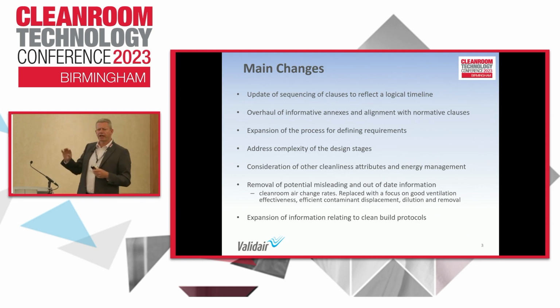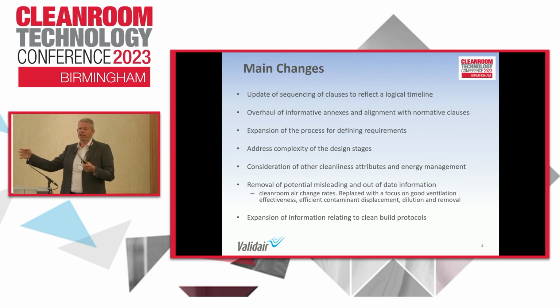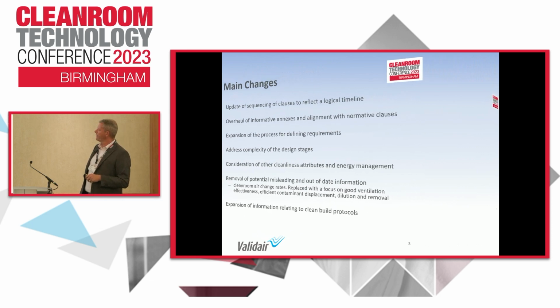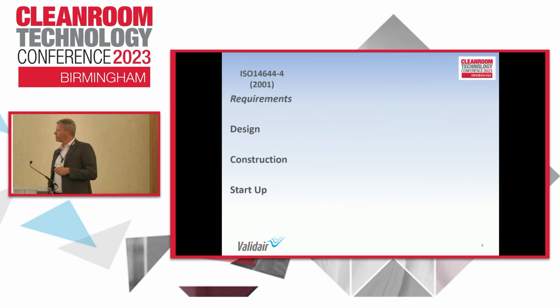And there was information around clean build protocols. A really important part of construction is that when you're constructing a clean room facility, you implement a clean build protocol, in which you put measures in place, with increasing levels of control, to limit the contamination being introduced to the clean room while you're building it. So information on that has been expanded within the standard as well.